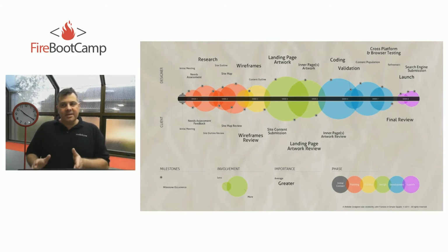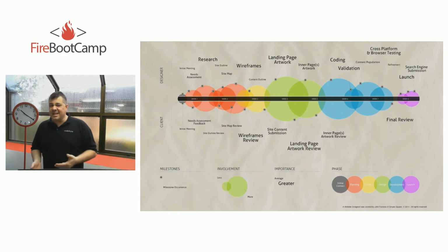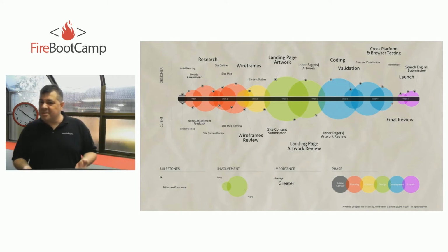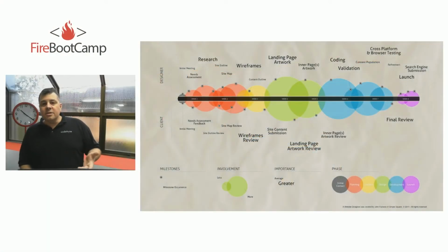If we think that there's going to be user acceptance tests the last 1 week, so you really have 8 weeks to develop this. You're in week 6, am I correct? Yeah. So you have 2 weeks. That means you should be really on the last 10% or so, 10 to 15%. So everything should be good right now, mostly working. If anything, there should be maybe few bugs on the user interface or business logic.